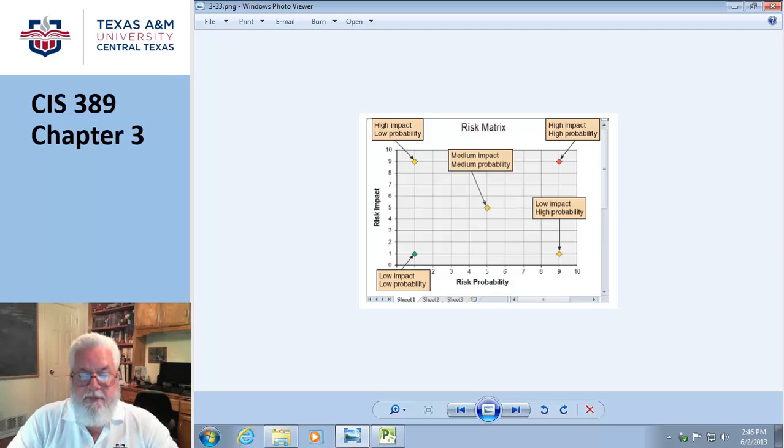Okay, so confusion between effort and progress. I put an awful lot of effort into it, so I'm 50% done. No, you may have put 50% effort into it, but I want to know if the task is 50% done. Just because you said it's going to take 40 man hours and you've spent 20, don't mark down that I'm 50% complete.